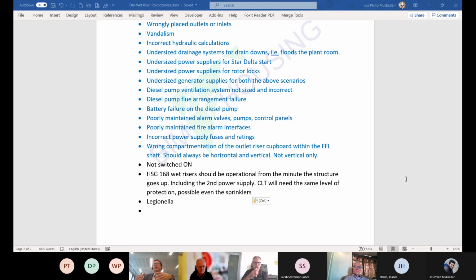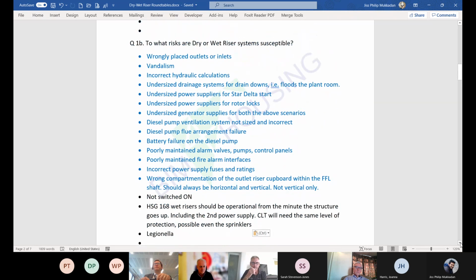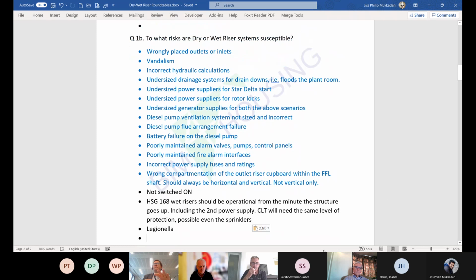If you've got a contract that's come in for tender, two-stage, where you submit your best price, then agree the cost plan, sometimes the design's already gone past stage 4, and the consultant's being novated to do nothing, so you're not necessarily going to see all of these problems. Hence the reason why, when everyone talks about the tragedy at Grenfell and procurement, the way that procurement happens encourages best price and fixed cost certainty over actually knowing what you're building. That makes sense.